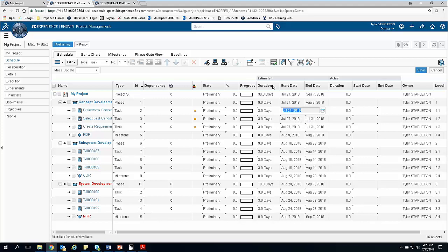Okay, now we have these all marked as 3 days long, but they're all still starting on the same day. Now I could move that by hand, I could move their start date to a different day, but I want to do this in a bit more robust method. I want to add dependencies that essentially are just going to say that each of these tasks need to be completed in order. Notice I'm just using the ID of the task before it.